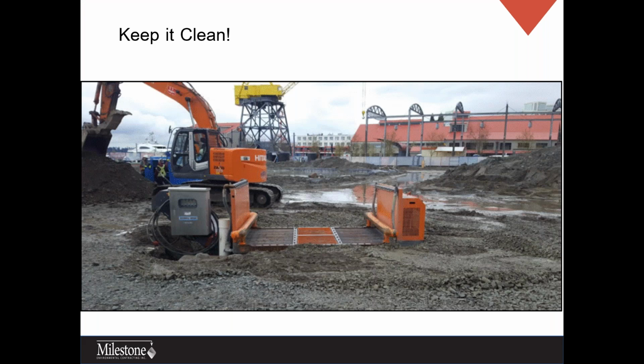While stakeholder concerns can be complicated, sometimes it's something as simple as roadway management, and it can be an important factor. And I'm not just talking about traffic control, but truck routes to avoid congestion and working hours can all impact locals as well. You have to consider cleanliness and ensure contractors keep up. In the case of this particular project, it was done during the wet season, and so road maintenance was a key issue for the locals and a concern of the surrounding public. So we installed a truck wash that would treat the water prior to discharge. And this helped ensure minimal impact to the surrounding public and kept everybody on our side.